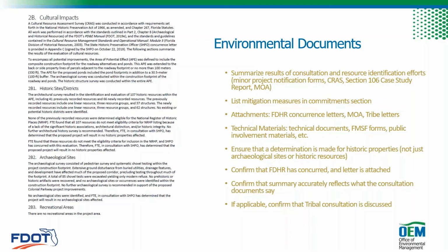CRAS's effects evaluations or other technical documents should be referenced in an environmental document but not attached. Those just live in the project file. But concurrence letters from SHPO/DHR and any correspondence with the tribes should also be discussed in the summary, and those will be attached to your environmental document.